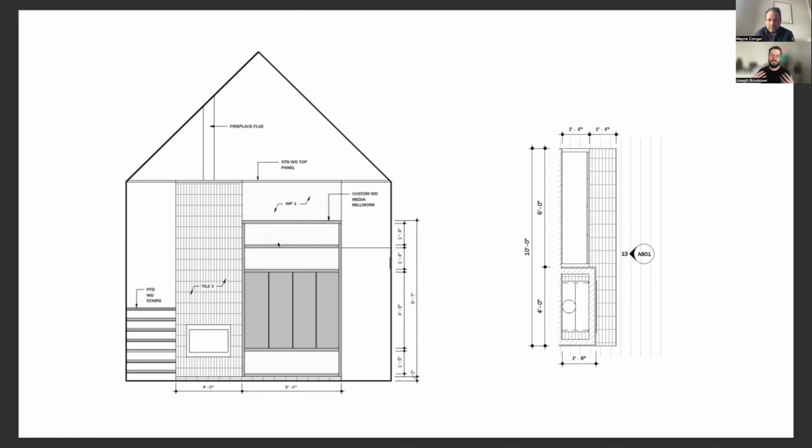It's not just to say Hut's is the expert, like we're telling everyone how these things need to be. It is a collaborative process where we're taking input from the cabinet maker, we're taking input from the builder, that if they see an issue with a certain thing that we're showing, we address that issue early in the process and get to a shared solution before wood is flying and grout is flying and tiles are being shipped to the site, that we're out ahead of anything that may be coming up.